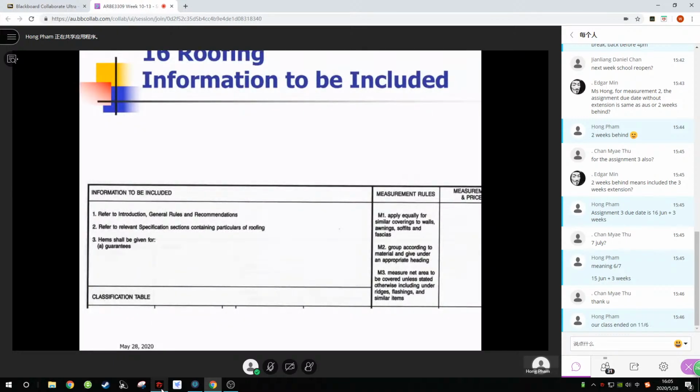You've got to chop the slab up and replace the slab. So whenever you're negotiating with a roof membrane company to do bathroom floor membranes or roof membranes that you're going to put something over the top of, remember, if there's a problem, they'll happily fix the membrane, but they won't remove stuff to get to the membrane, and they won't put it back.